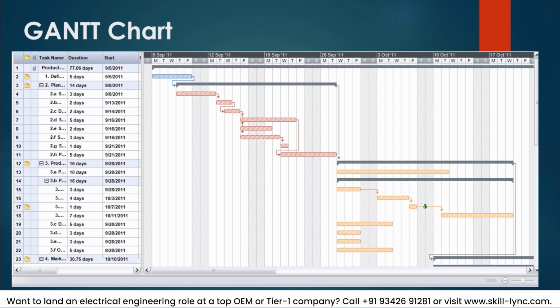Here the tasks are split down into major and micro levels, and each is identified with a separate timestamp, and then dependencies between the tasks are defined, and milestones have been set, so that you get to understand the flow of the project, where you are, and if there is any delay, how it is impacting the overall time plan of the project.